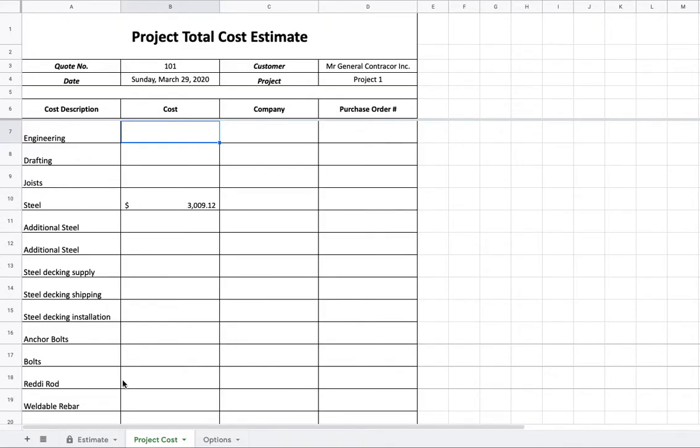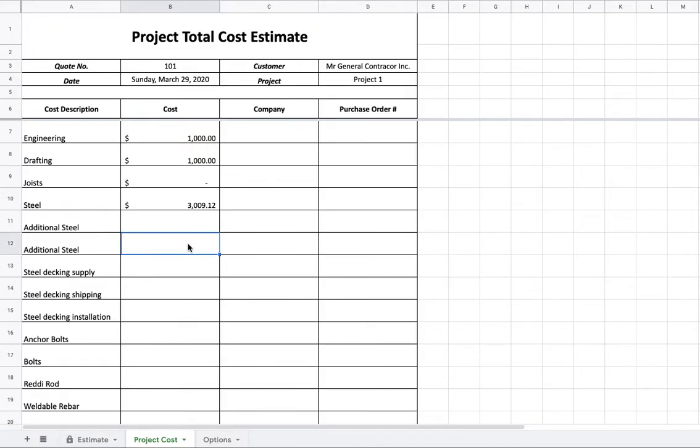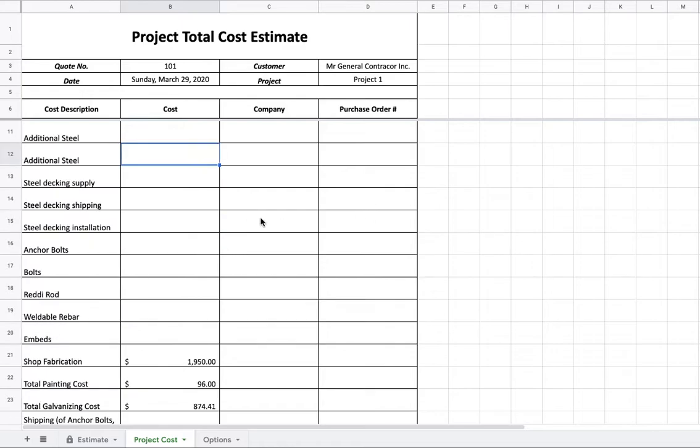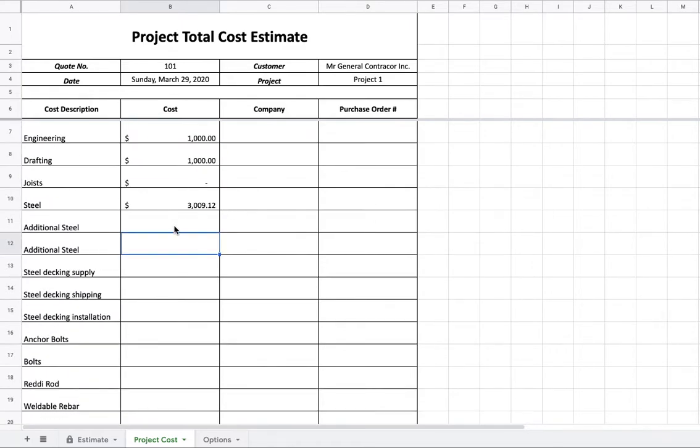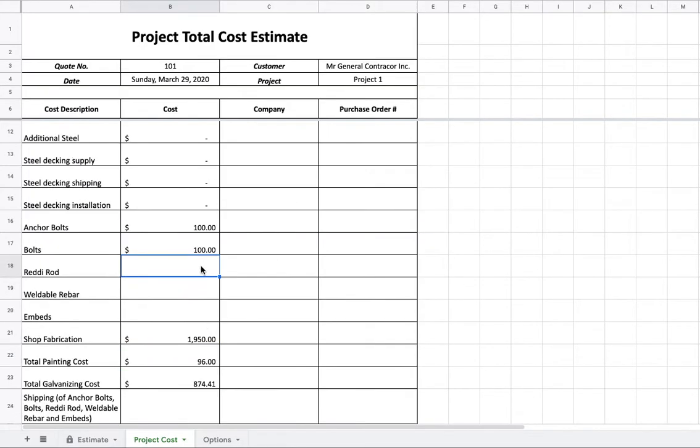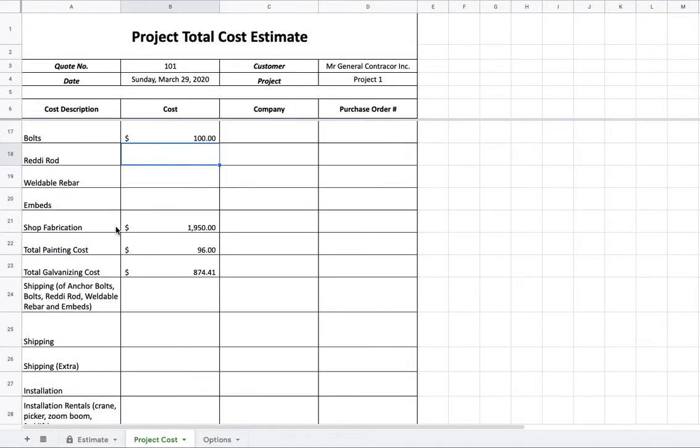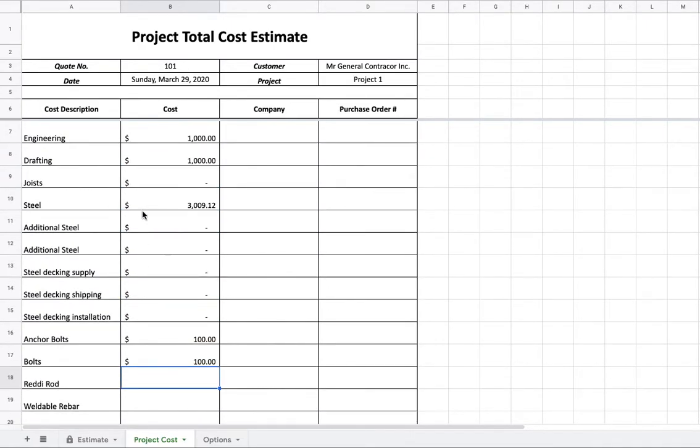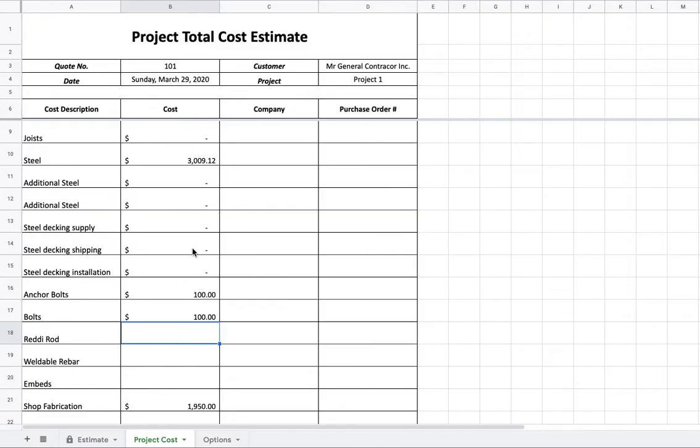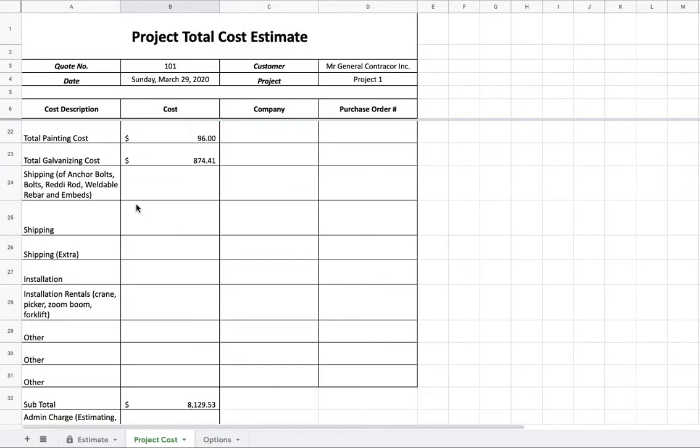We have a checklist of items that I've found that you need to do a job. So let's go through them. Everything is all auto populated up here. Let's just for example's sake, let's say shipping $1,000, installation $1,000. What you would do here is just use your quotes and your experience from other jobs here. We don't need any additional steel. No decking on this job. Anchor bolts, let's say there's $100 there. Bolts, let's say there's $100 there. Ready rod, we don't need any of that stuff for this job. Already auto populated. I skipped over this. The steel is already auto populated. Shop fabrication, total painting, galvanizing, all that's already done.